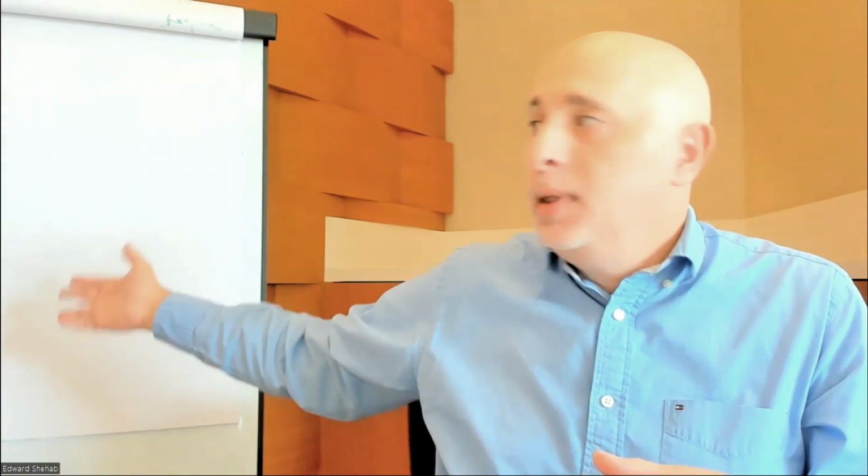If you have a team, then maybe you can run a workshop or a brainstorming session, bring everybody in, put up on the screen, write down what the project objectives are, and maybe key milestones and so on, and then ask the team to identify risks. So you need a lot of people who are negative, right? Not really. And there are different ways in a group session where you can obtain information. You have to guide it, right? You need to discuss different aspects or modules of your deliverable or project and ask them to identify risks.